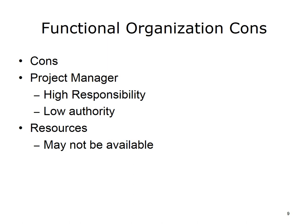A drawback of a functional environment is that the project manager is at the mercy of the functional manager for obtaining project resources or dealing with poor performance of a project team member. A project manager may be given a significant project to implement, but he or she is really dependent on the functional manager to accomplish most of the project's goals.